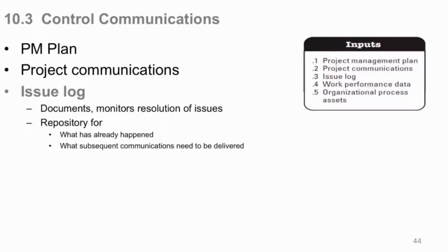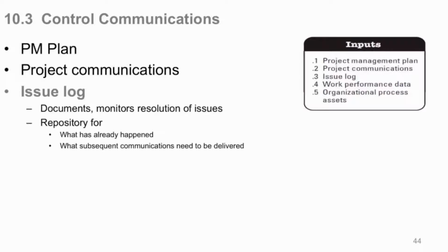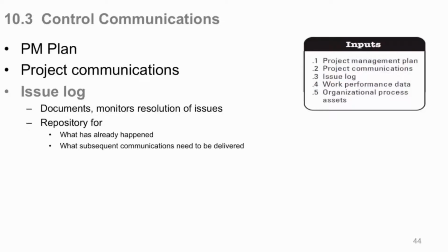Documents, monitor resolution of issues, your issue log is a repository for what's happened. Here's the issue. Here's who's responsible for resolving it. Here's when they've got to resolve it. Here's how they resolved it. That's what's already happened. You've got a log of that. And what subsequent communications need to be delivered. Like I say, they say, well, I need more than this now. Okay. Or I need less than this now. You need to make some changes.